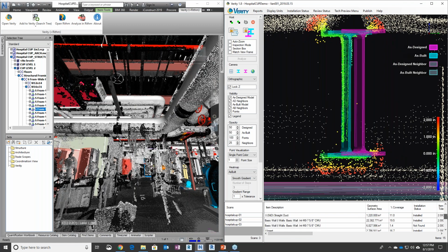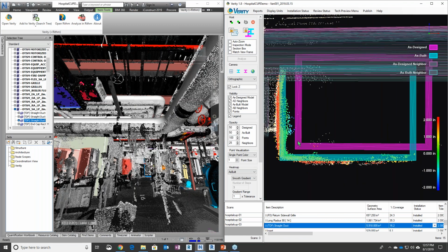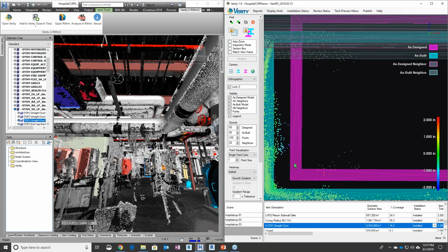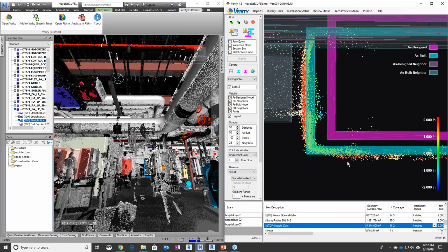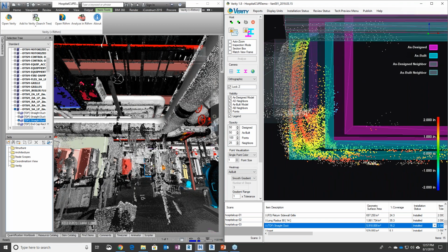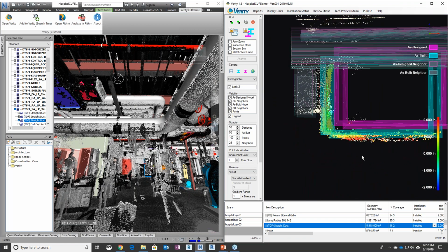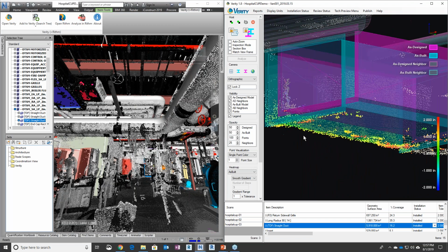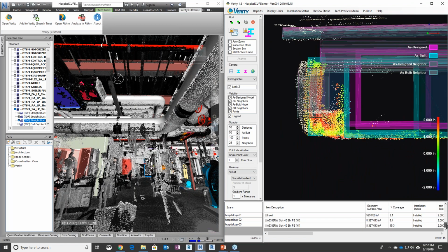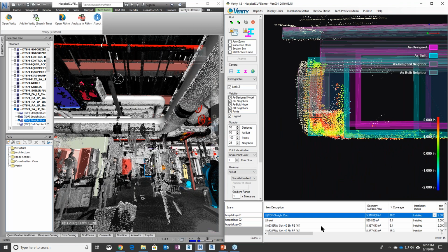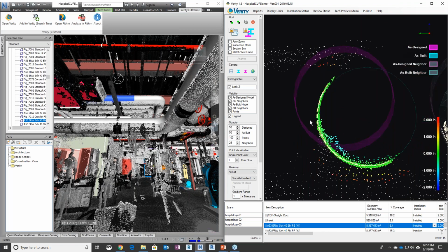We also have that problem quite a lot with things like duct, for instance, where the sheet metal gets modeled and the scan's done after installation, and you have to come in and just visually look and see if you think that ductwork is in the right spot just based on the data that you have on it. So if you can't get a hold of the model and get some insulation in there, then you have to do a visual inspection.